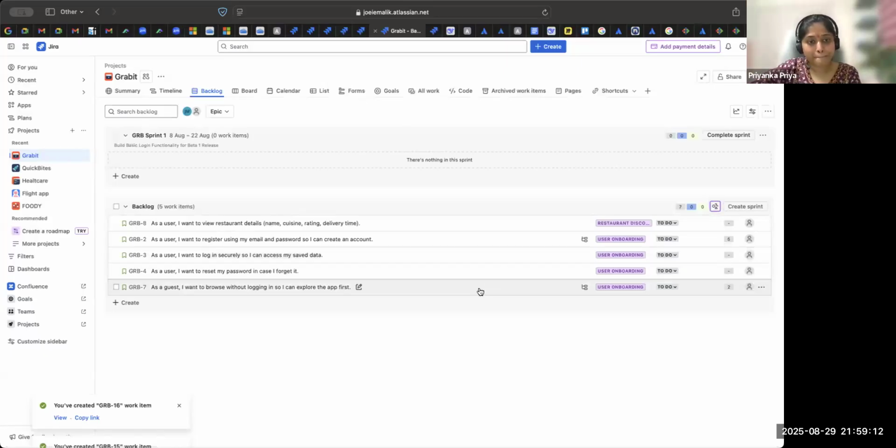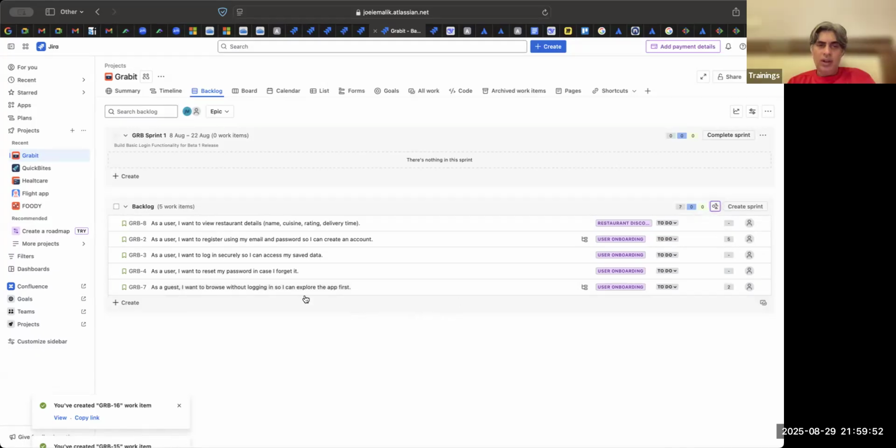Sir, one question. Acceptance criteria is already added by the PO before the refinement. He will have a basic acceptance criteria, and then there will be a discussion. Based on the discussion, he may add one, two or three points, or he may reduce one, two or three points. The SM will go through all the acceptance criteria one by one, saying, I need this, and then people will ask questions. Developers will understand whether it is technically feasible or not. The testers will see whether it is testable or not.